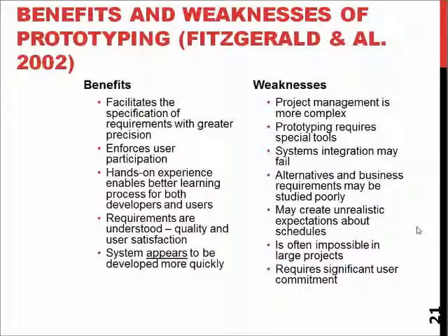You may also end up with a problem that you are giving such good prototypes to the test users or customers that they want more and more and more features in it, which is something we call featureitis. It means that you promise too much and want to do too much, and are unable to complete all the features in your final version of the software. It leads to customer dissatisfaction because they thought that you would be able to deliver, since you already gave them a quite nice working version, or that you promised so much that the customers had expectations which you were not able to fulfill. It may also end up causing problems with the schedules, and well, you have to have the user commitment to your work.